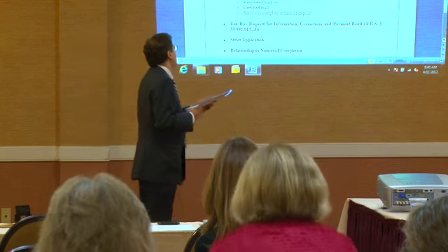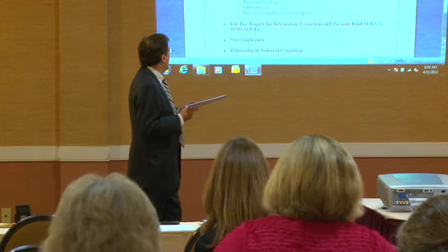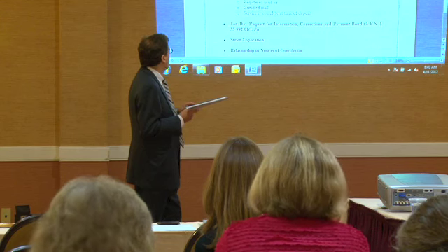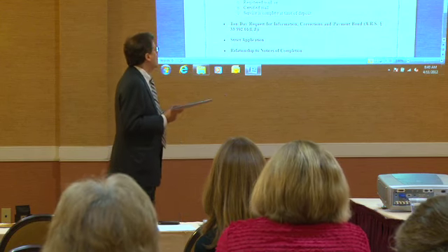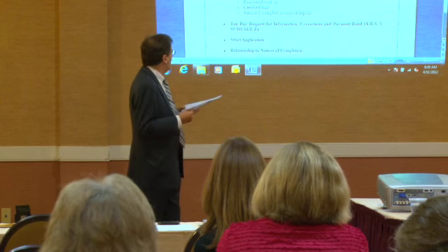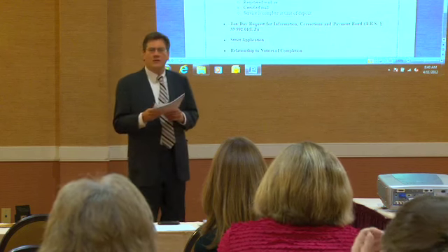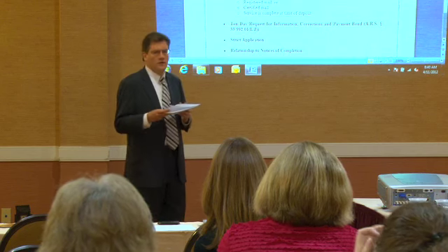How must service be? The other people, the person with whom you contracted, you've got to send the information to them. The general contractor, if different from the original, and the reputed versus actual parties. What are we talking about on reputed versus actual parties? Sometimes you don't know who the owner is. You did your very best and you just couldn't figure it out.